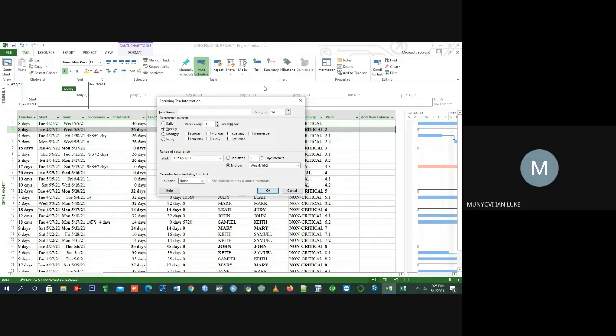Now, there's where you can decide how often you want to do these activities which are recurring. So I want it to be monthly, maybe you're doing it on a monthly basis. Go to monthly, and then you want it to be the 4th week. So click there. The next one, after day, the next column, there's an option there.